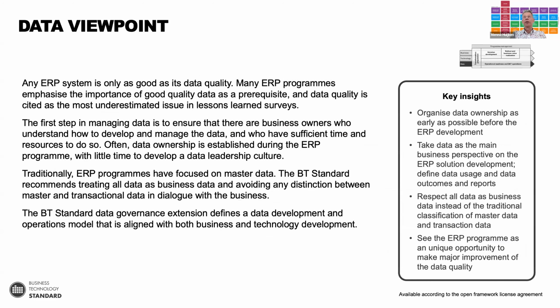I already mentioned the data viewpoint, and I also want to stress it, because it's a typical bottleneck in ERP programs. There is always a huge amount of data migration and data cleaning. Your ERP provider might just give you a set of templates and ask you to fill them in so they can upload them, and then it becomes a bit of a scramble. So it's very important to get this data viewpoint in control before you even start the ERP transformation.